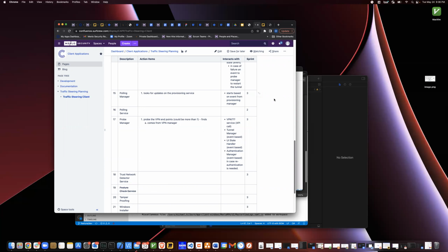That way, we know, for example, that everything on Windows will be done by, say, sprint 6. So we do that kind of planning. The goal is that in Jira we want to have epics and user stories. Well, at least we want the epics for everything that we're going to need, with nothing missing. We have those epics, and we know what sprint we're going to complete that epic by.